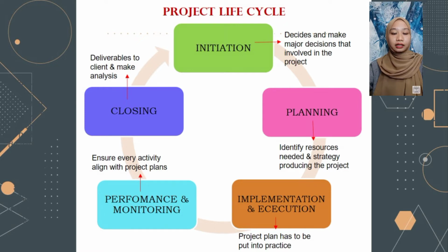Closing is the final phase that is very important as it offers the deliverables to the client. We also need to review the punch list to see that all weak areas have been accomplished. Finally, identify what went as planned and where things didn't go well. So, this analysis can be useful for future project teams.